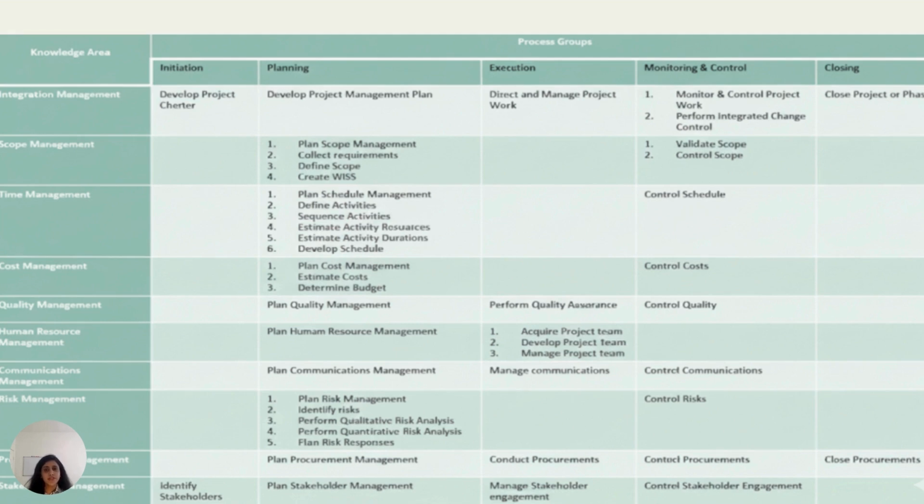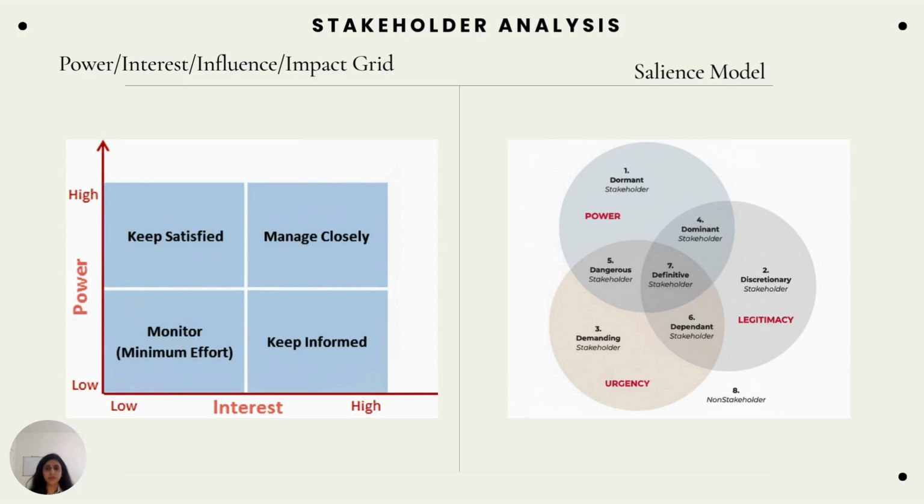To prioritize, we first look at their stake in the project. Why do they care? What do they stand to gain or lose in the project? Their interests, their rights, their ownership, their knowledge and contribution to the project. So prioritization is power, influence, and impact, right? And that is something which we call stakeholder analysis. How much power and influence do they have in the project, and the impact.